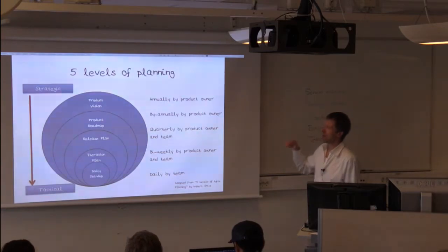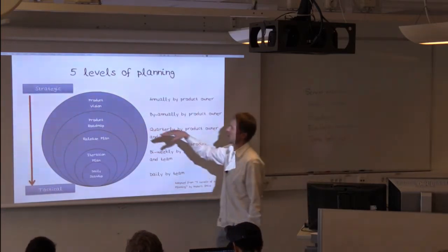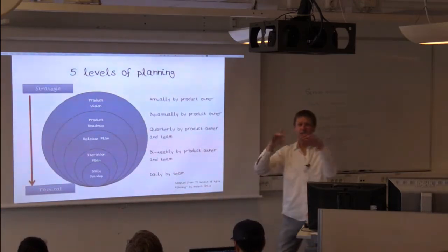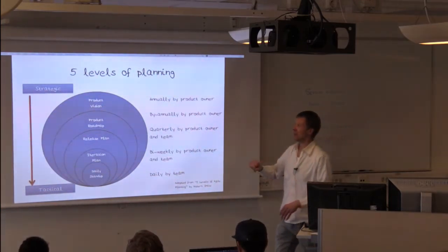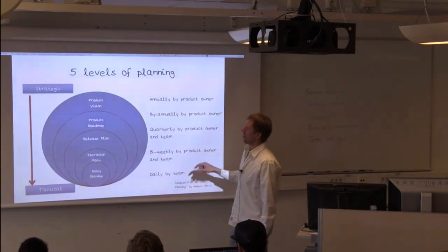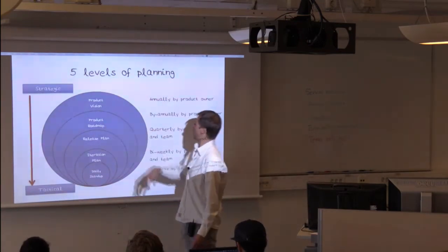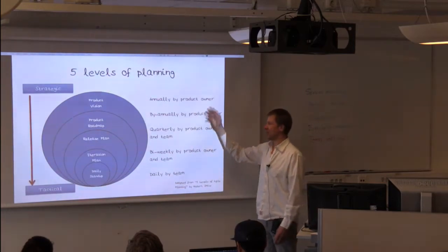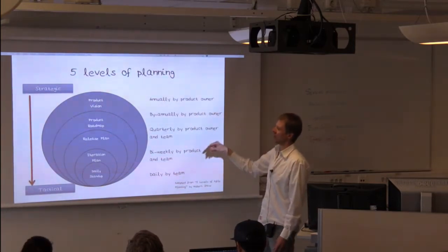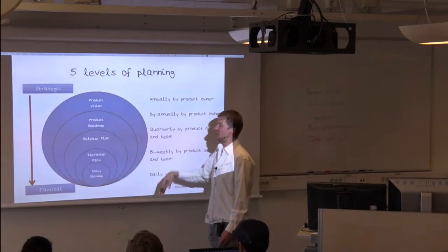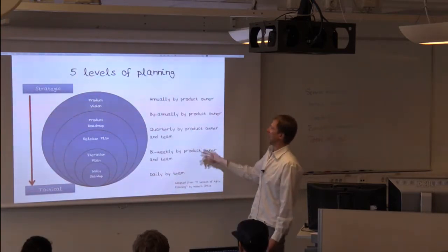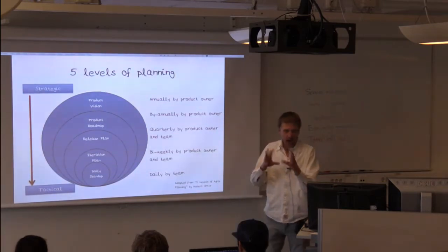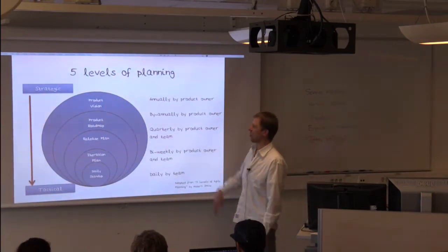So there's essentially 5 levels of planning. It's like the most strategic one, which is kind of the vision for the product. And this typically happens like annually. They might revisit these kind of things. Then you have some kind of roadmap for the product, and these are just averages, twice a year they meet and modify and revisit the product roadmap. Release plan is kind of thinking for the next release of the product, right? And that's typically around quarterly.